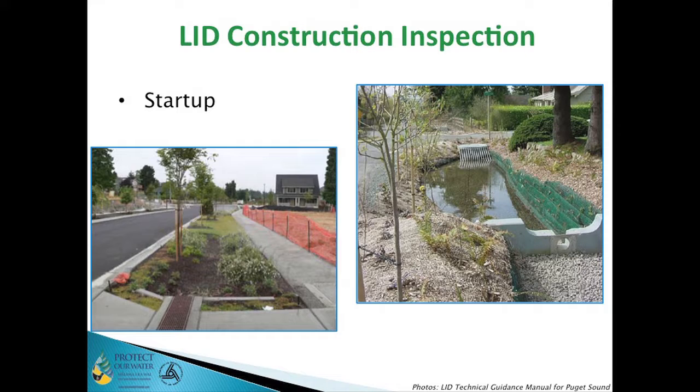Our typical highway project, we finish up everything, we have a punch list, maybe there's some striping they need to fix, and this curb over here needs to be repaired, a few little things, and we need to get grass establishment over here, and we walk away and we come back a year later to see if the grass grew, and that's kind of the period. And with these, we have almost a different cycle for this startup and O&M and maintenance period.